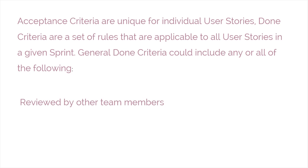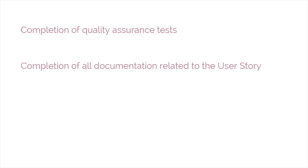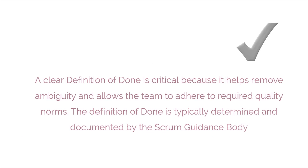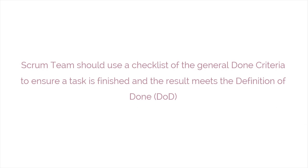General done criteria for user stories can include: completed user stories to be reviewed by team members other than those who developed them; completion of unit testing; completion of quality assurance tests; completion of all documentation related to the user story; all issues are fixed; and successful demonstration of the completed user story to stakeholders and/or business representatives. A clear definition of done is critical because it helps remove ambiguity and allows the team to adhere to required quality norms. The definition of done is typically determined and documented by the scrum guidance body, and the scrum team should use a checklist of the general done criteria to ensure a task is finished and the result meets the definition of done.